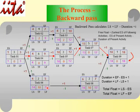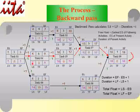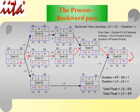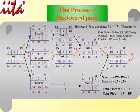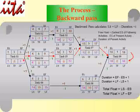For Task 6 with LF = 15 and duration = 2: LS = 15 − 2 + 1 = 14. This returns a Late Finish of 13 to Task 1. Other paths return different values: one returns 3, another returns 4, another returns 6. When doing the backward pass, where multiple paths feed back into one task, you take the lowest (smallest) value — because that is the most restrictive constraint for when that task must finish.